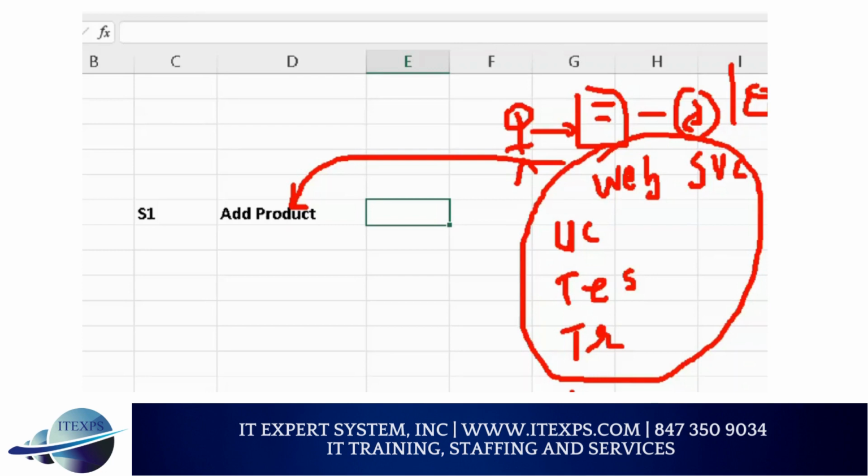So people say, what does this web page mean? Can you explain? So I can say, you need HTML, you need CSS, you need some design. The person says, but we need a graphics artist. Yeah, then we need a graphics designer. We need this page. But how will the logic work? Oh, we need Java. I know Java, but we don't have the software. So we need to install software. That's a task. So the more tasks you identify, the better for you to do estimates.